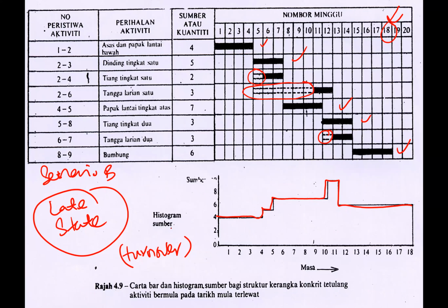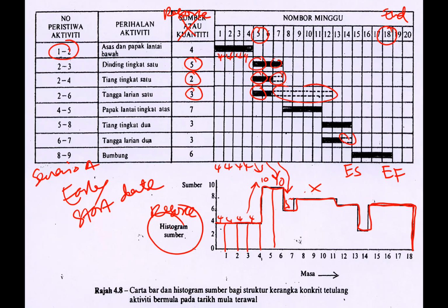Labor turnover is not good in construction because you will demoralize the workers. The productivity will be gone. It is not according to what you plan. A lot of things. Nowadays, even in Malaysia, we depend too much on foreign workers, almost 80% of our workforce in construction. If some of the workers run away from our project, they are not coming, then it is very difficult to get workers. You can get workers, but without the experience, that will affect your productivity. So you would like to maintain the good labor force that you have, but then you will start with the issue that on certain days or weeks, there could be more people, and then there could be fewer people.